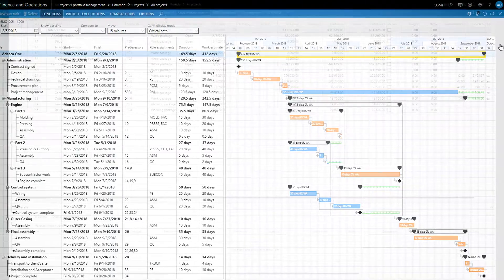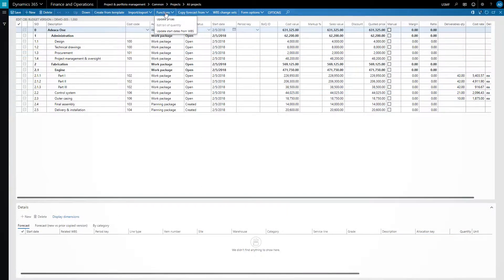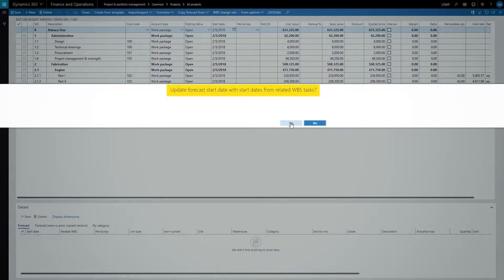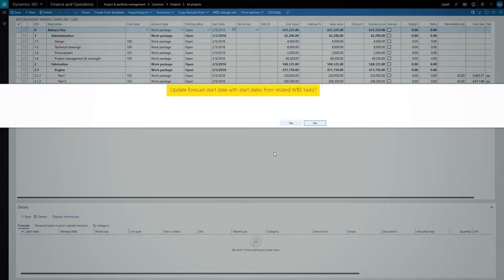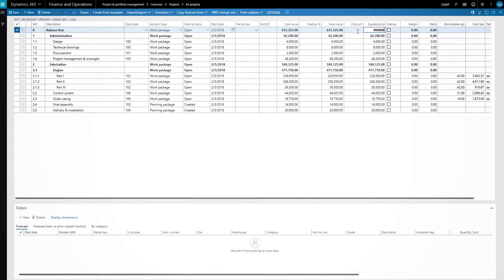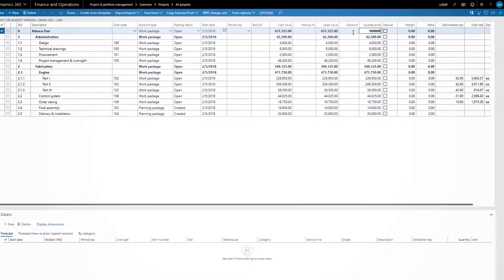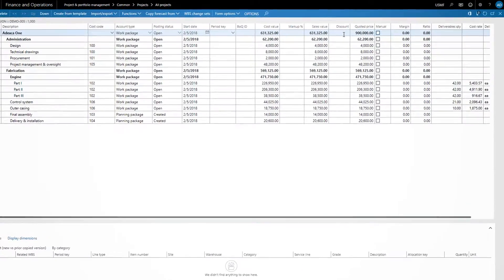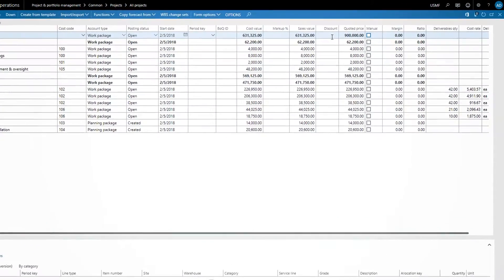For instance, in the cost breakdown structure, we can retrieve the hour estimates from the schedule and use these to build out our labor budget. We can also use the project timeline to accurately time-phase our earned value estimates.